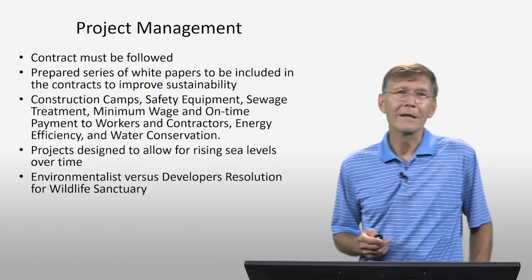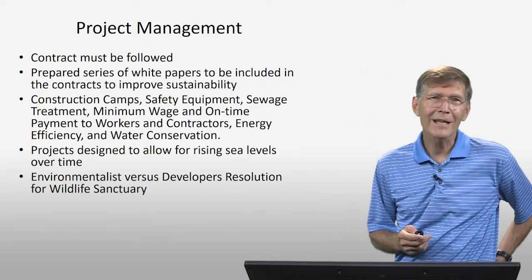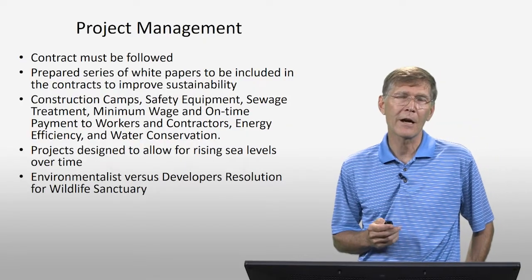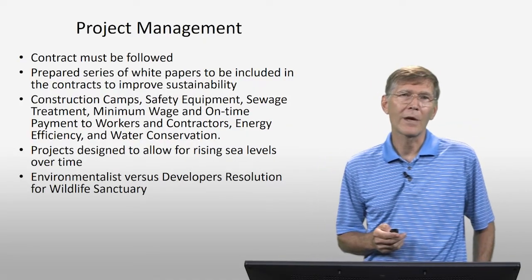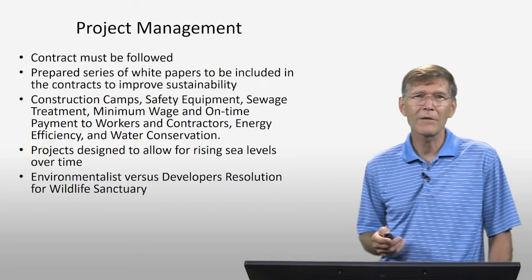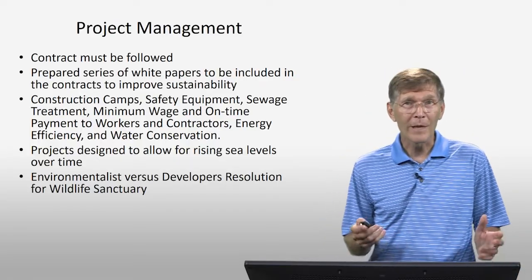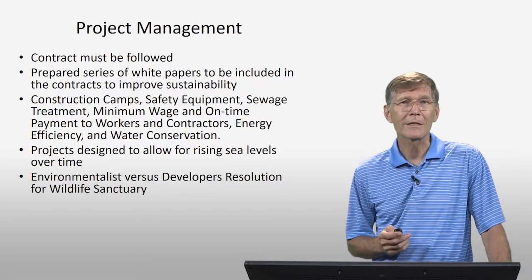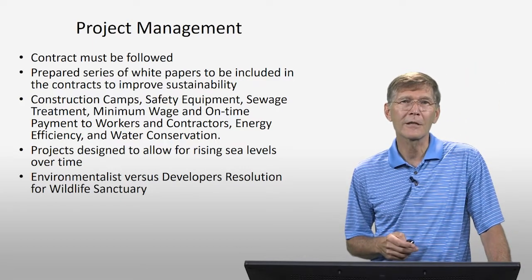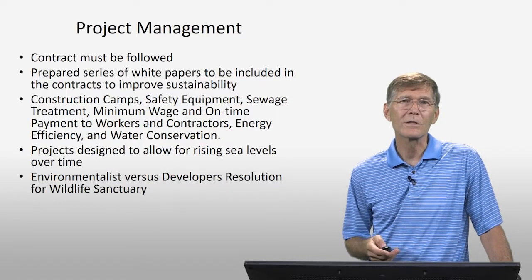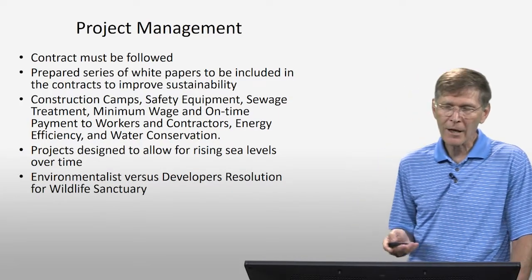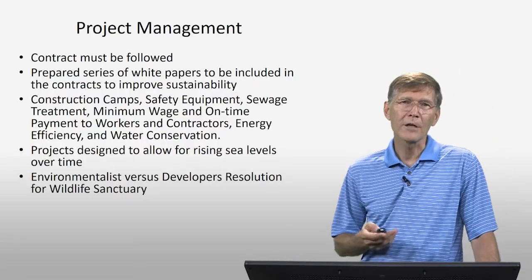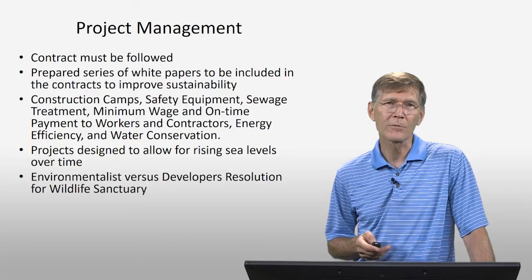So what we did is, since the contract had to be followed, we prepared a series of white papers to be included in the contracts for our project. We had one for the construction camps, one for safety, one for sewage treatment, one for minimum wage and on-time payment, because we weren't the only ones who had seen that problem. That's a major problem across Dubai. We had one on energy efficiency, one on water. And we would put these white papers into the contracts to ensure that our project didn't go the way of a lot of these construction projects.